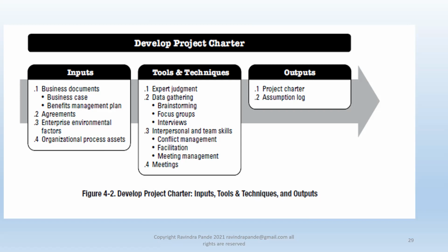And that's why we normally have even agreements, contractual terminology, whatever included, including the overall penalty clauses and other clauses like that. Penalty clauses specifically we need to understand in terms of if we have any fixed delivery dates. Let's say you are developing something and you need to deliver it to the client by such and such date, or otherwise there's a penalty. Might be monetary, might be some sort of a credit delay or something like that.